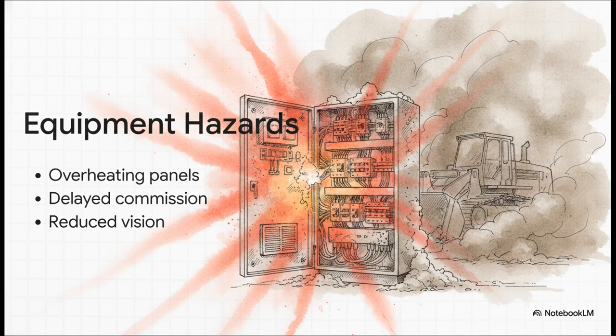If sensitive devices get contaminated, well, that leads to malfunctions and delays in commissioning, which throws off your whole project schedule. Plus, widespread dust clouds reduce visibility on site, drastically bumping up the odds of heavy machinery accidents, all while spreading to neighboring communities and causing major environmental issues.